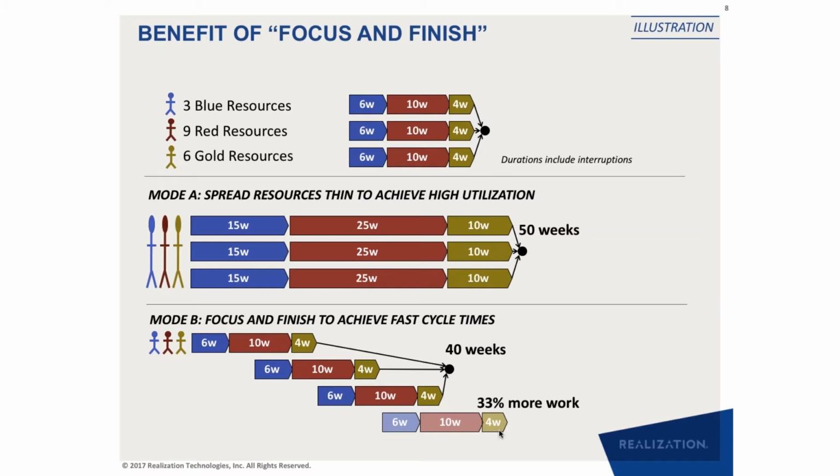This is an important point because I think what has not been talked about in projects often is this resource buffer idea. A lot of focus has been on the time buffer, and even the resource buffer that is talked about by Eli in critical chain is really a time buffer. It talks about resources having some time before they are committed to a project. So the idea of capacity buffer in projects, when I say resource buffer, is capacity buffer. The idea of capacity buffer is probably an underappreciated idea or not even part of the body of knowledge. Having capacity buffers in projects is extremely important.